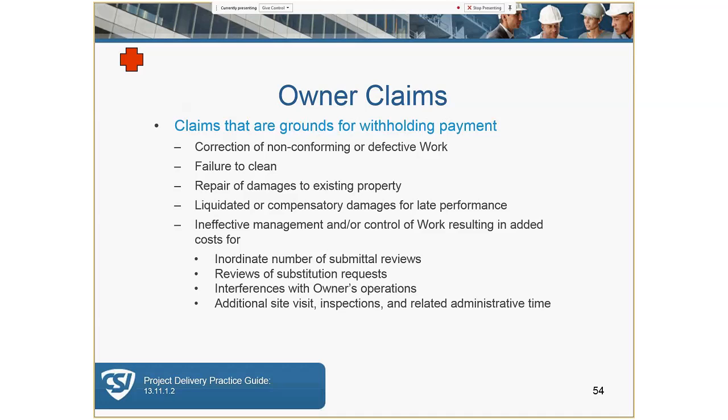For example, if the contractor is late in ordering custom windows, or the contractor's superintendent or project manager quits halfway through the project and never ordered the windows. By the time the windows arrive, it's 3 months beyond the due date when the project was supposed to be completed and dried in, and the critical path is impacted. So the project is late, the AE incurs extensive cost in reviewing shop drawings, attending meetings that weren't planned, or has to work harder to help meet the project schedule. Then the AE may submit for additional services and request that the owner backcharge the contractor for those.